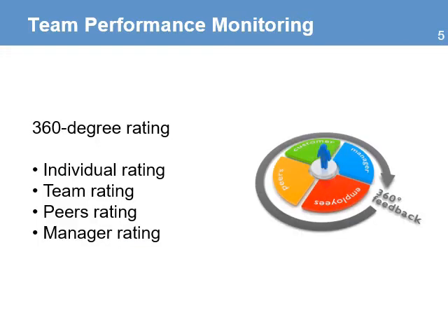Another tool to measure team performance is the 360-degree review. It is a process where different people rate the team's performance, and combined, it represents the performance rating of the team. Each team member first rates the performance of the team. The team, as a group, rates itself using a self-assessment questionnaire. Other peers from the organization who have direct contact with the team will also rate the performance. And finally, there will be the review from the project manager.